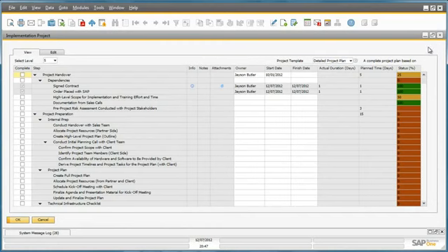The implementation project is a project management checklist or project plan based on the Accelerated Implementation Program methodology, also known as AIP. You can find all of the steps in the AIP. It gives you a detailed view of specific project tasks and the steps within a task. You can also define an owner for these tasks, the start and finish dates, the actual duration that the task took, and the planned time that you expected to execute the task. And of course the status of the task.